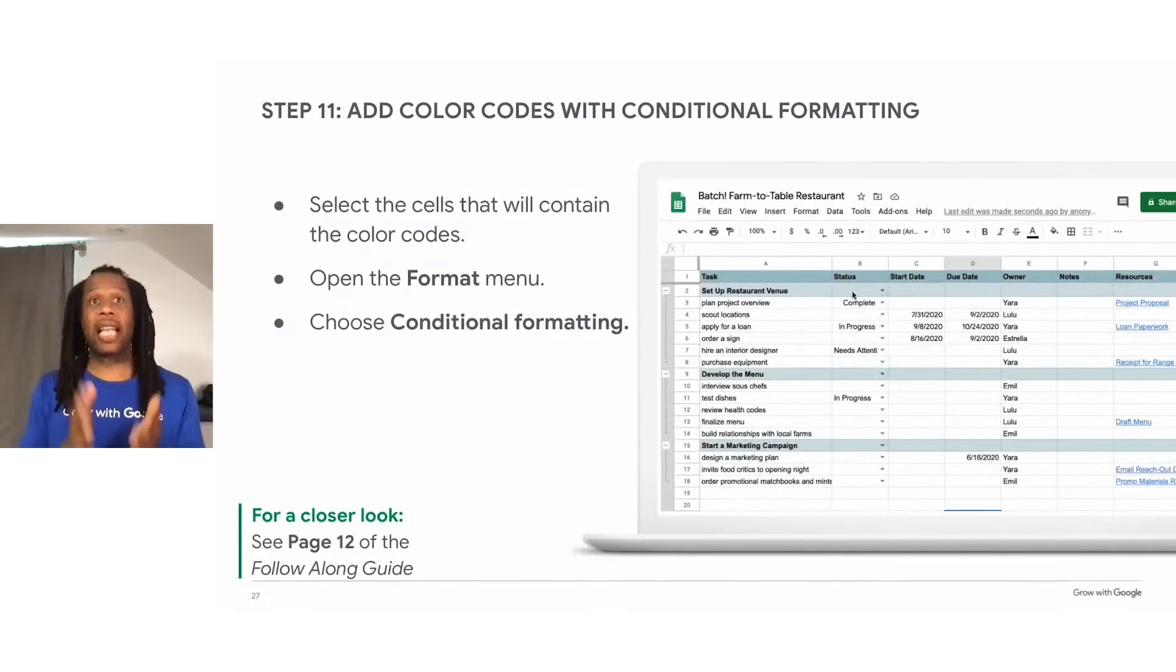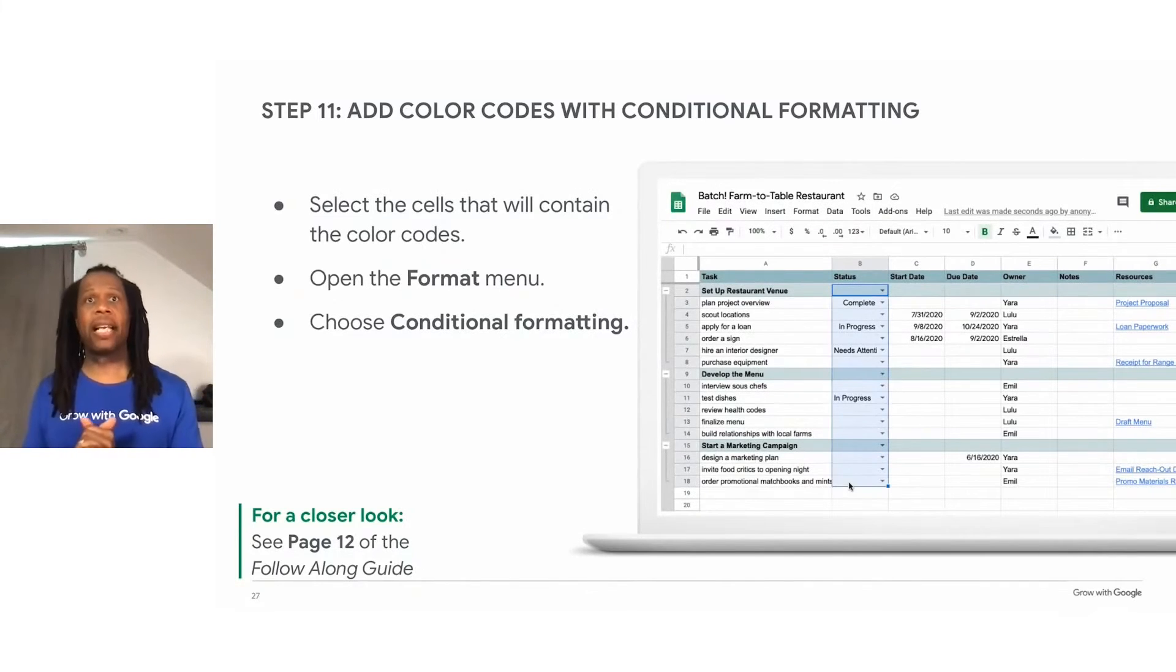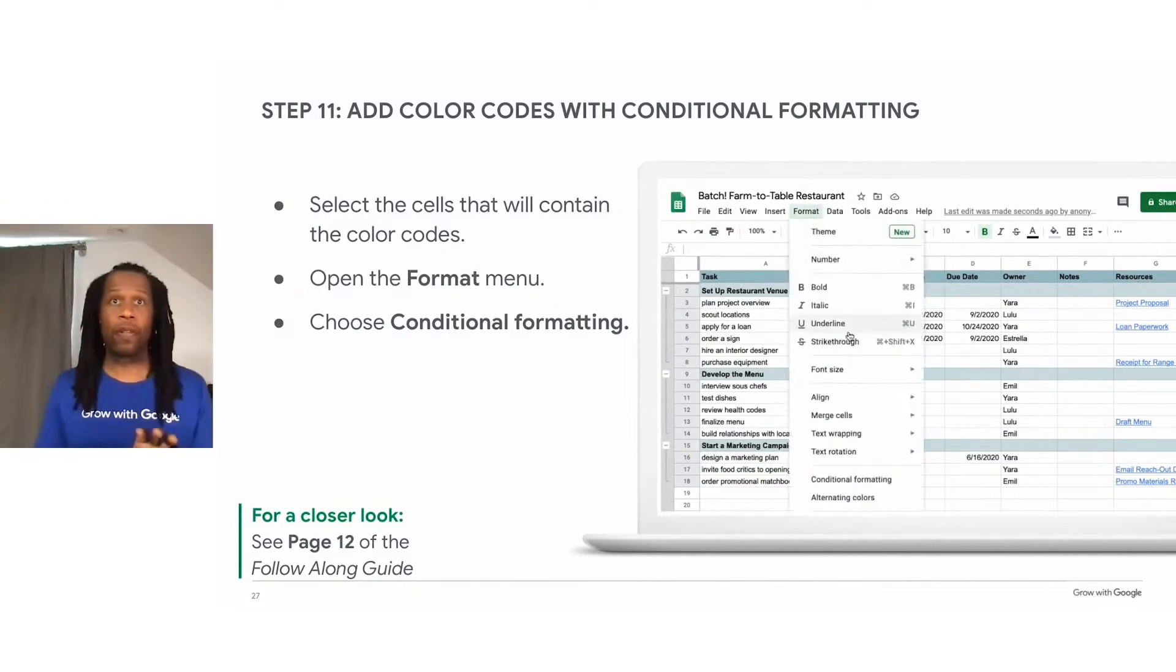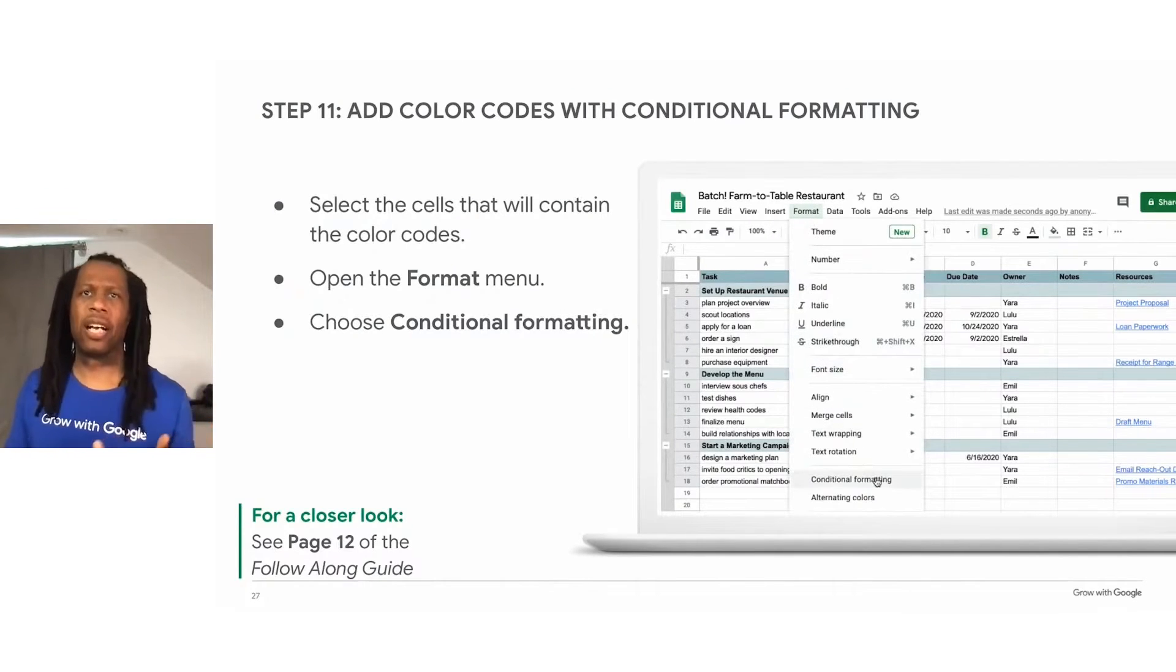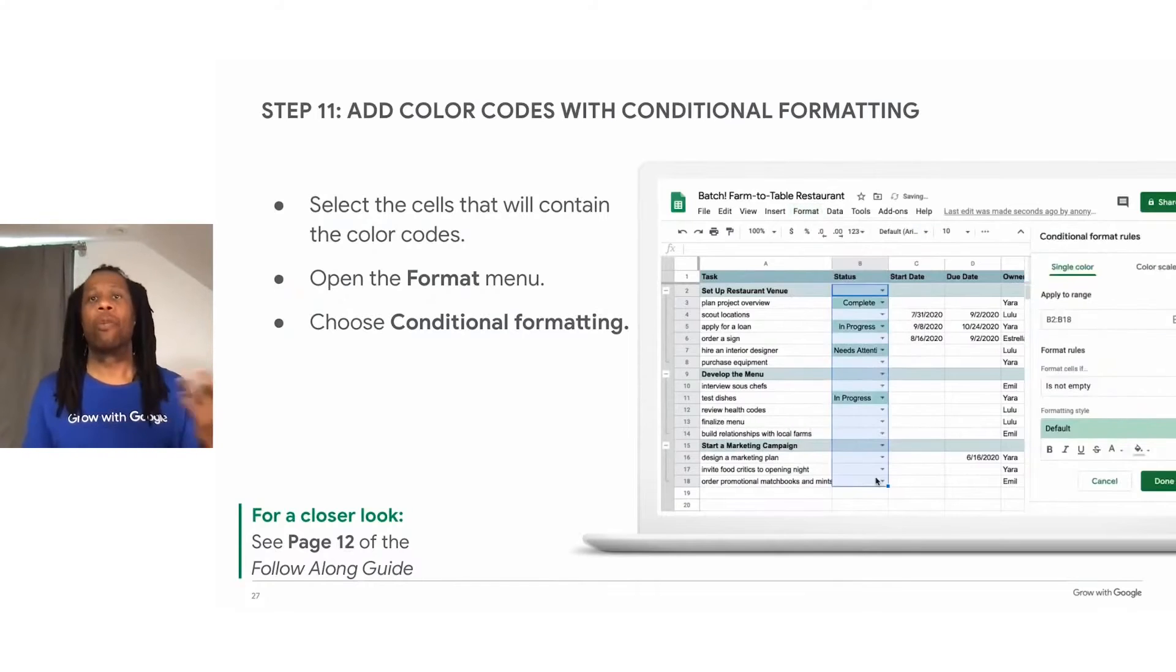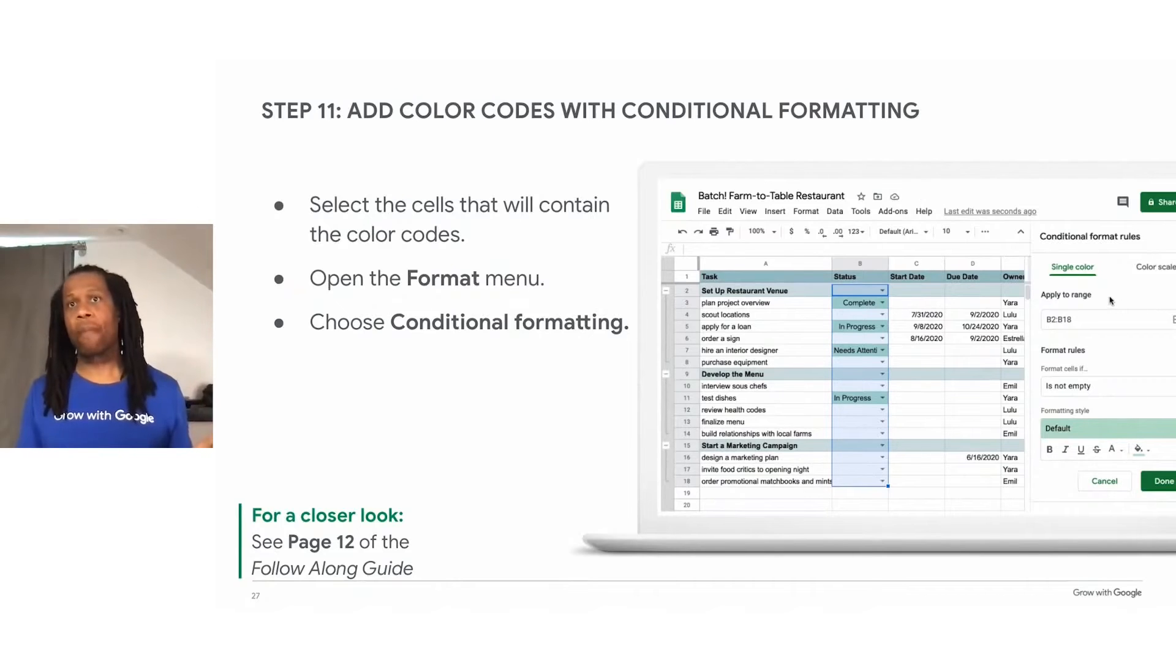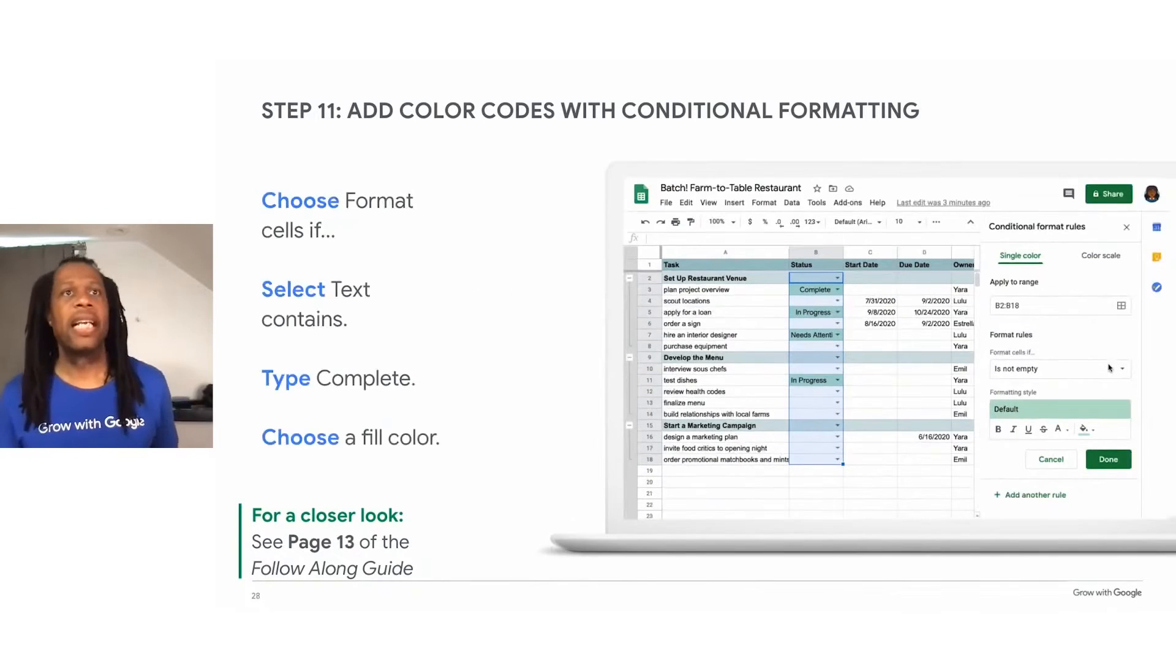So first, you need to select the status column. Select format after that and then conditional formatting. The cells you highlighted will show up in the box as the range. The range is a group of cells that will change. The animation on this slide shows a user selecting the status column and then opening the format menu to begin adding conditional formatting.